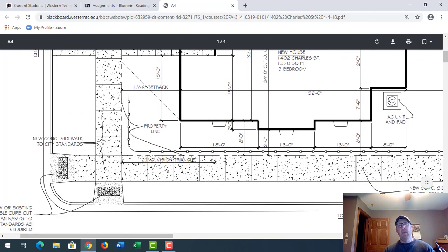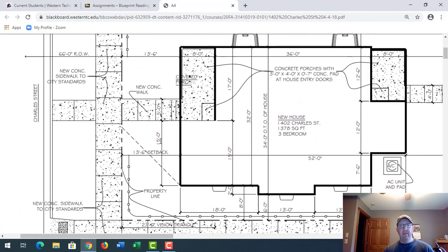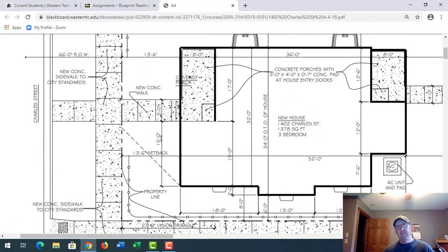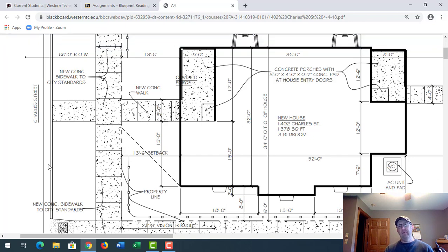We also have to think about, guys, erosion control. What is that? Well, that's going to be a requirement set by the DNR, but it's really policed through the building inspection department. That's going to be in the form of silt fence, things that prevent, during a heavy rain, a newly excavated site from getting out into the streets and into the storm sewer and polluting our waterways.